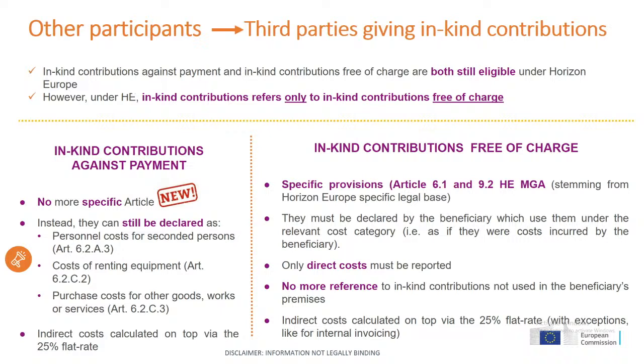So under the previous framework program, under Horizon 2020, there were specific provisions for both types of in-kind contribution. Under Horizon Europe, both types of in-kind contribution are still eligible. However, in Horizon Europe, when we talk about in-kind contribution, we refer only to in-kind contribution free of charge.